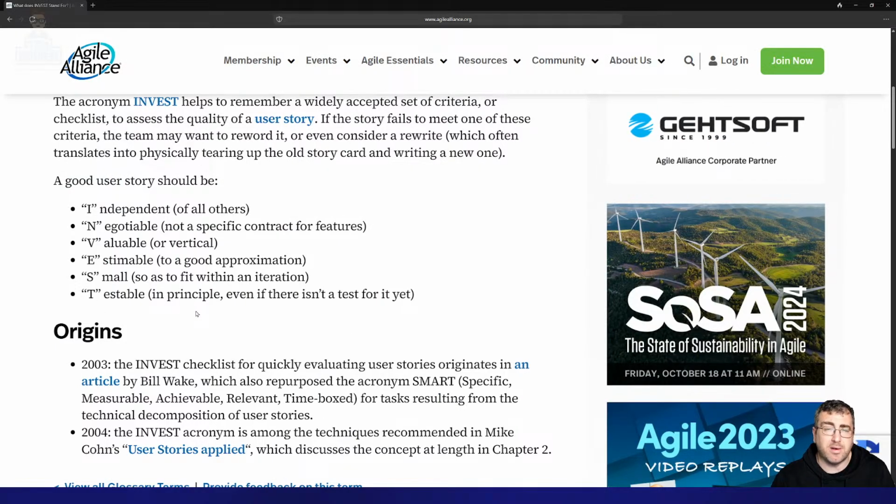They can be independent, right? We can build a component of the software that doesn't require everything else. We can still talk about what it needs to be. We can say it has value because it allows us to start moving this forward and it ultimately achieves this feature, right? That's the value. Estimable. Can we say, yes, we can actually take this piece and work on it? Is it small enough? Yes. Can we actually get it done within the sprint?